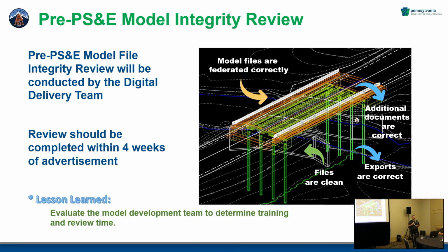We have to look at it. We have to go through all the steps, check to make sure those end conditions match up, that we don't have different names on one template to the next, all those things that make it a good model. But how do you check that? Because you have limited resources that have the knowledge of it. So we had to really start thinking about how to review, how to go through that process. So evaluating that is important, and the timing of that's important.